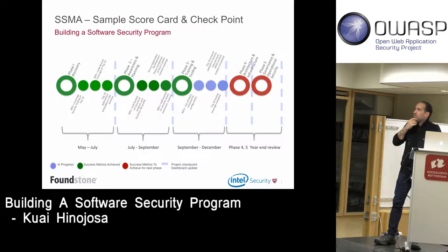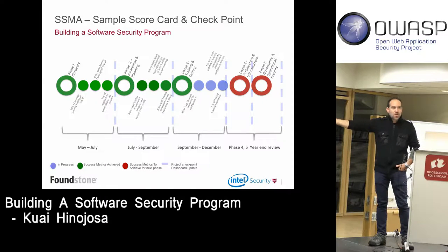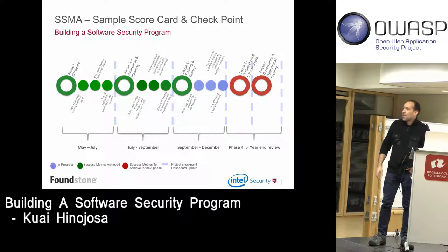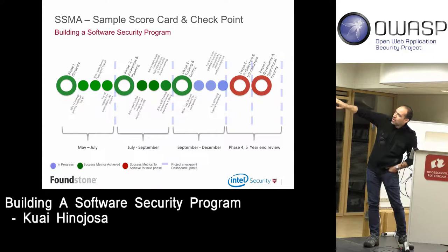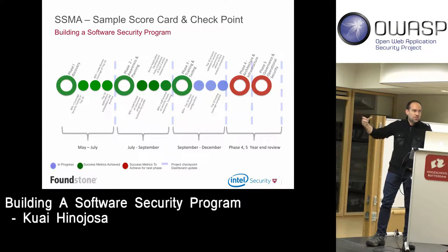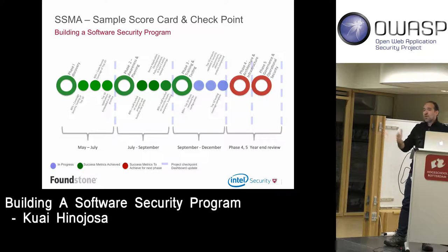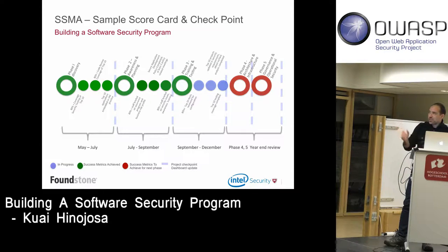This view shows success metrics on a project schedule. I find it very useful when working with customers and partners — the executives who are paying the bills want to see how we're doing against the plan. You can see in green the discovery phase showing 80% or greater code review of the top ten applications. We use these timeline charts to show progress at each checkpoint, and sometimes if we don't meet the expected maturity objectives we extend the timeline by adding another month.